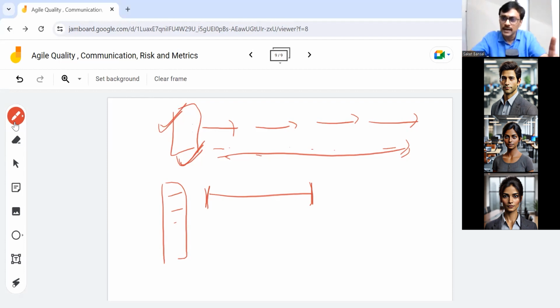It is not even a hybrid of Agile. You can't even say it's Agile. It's pure waterfall, which may have some elements of agility. So you can say more than 50% is a predictive life cycle if your review demos are not happening at the end of the iteration. Now, assuming you are following the Agile approach, where at the end of the iteration you definitely have an increment which meets the definition of done and you are reviewing it.